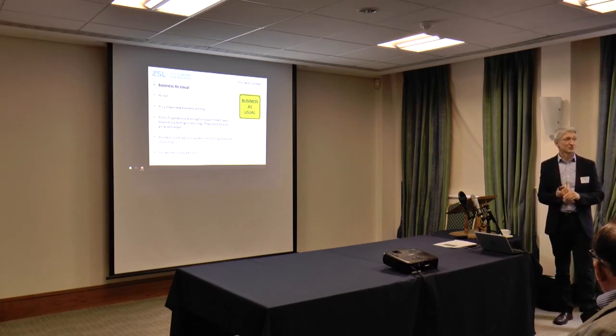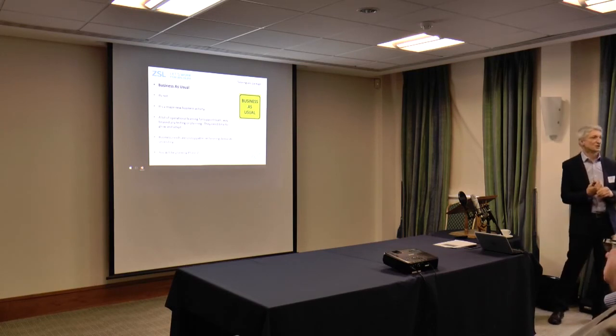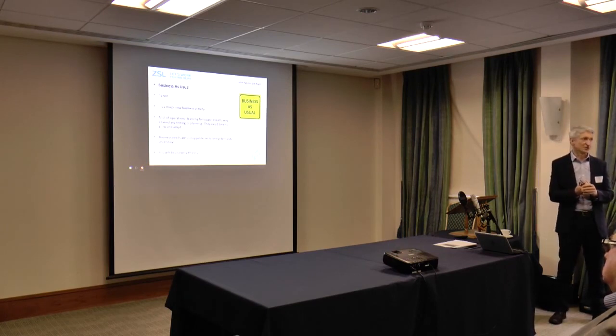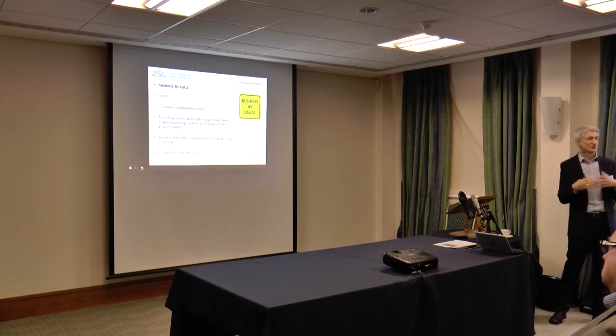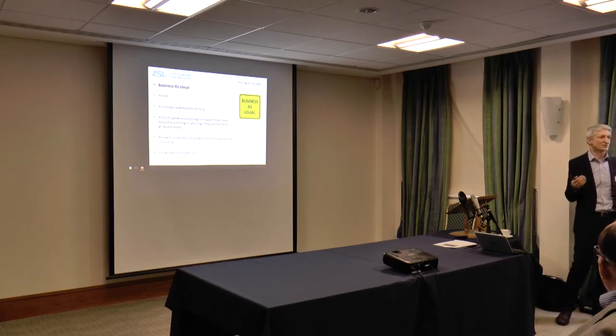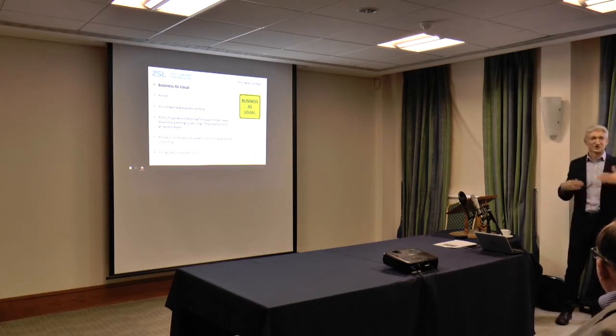They're not going to know the answer necessarily to all those esoteric questions that suddenly a user has. They may get them in a few months' time, but they're not necessarily going to answer them straight away. And we certainly felt that the operational needs of the organisation, once you've gone live, from our point of view of this project, was a bit of a tsunami, because we'd changed so many moving parts. And even though we'd done all the processes, we'd done all the testing, we'd done all the business cases, we still had that day one, someone rings up and goes, how do I do X? Well, you never asked how to do X. Oh, but I've got a customer on the phone, I've got to do it. You're immediately then into a management to manage that call, plus the other stuff that's coming.